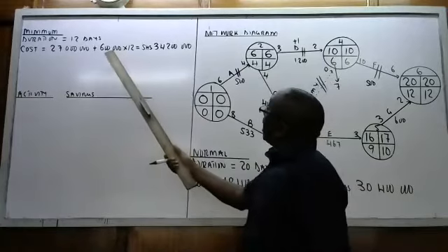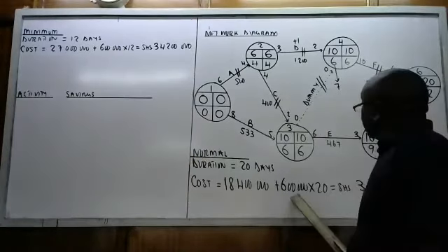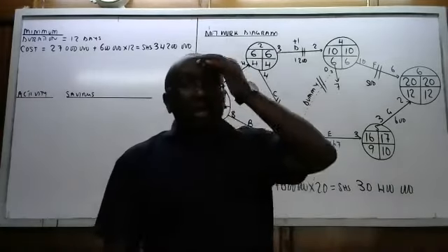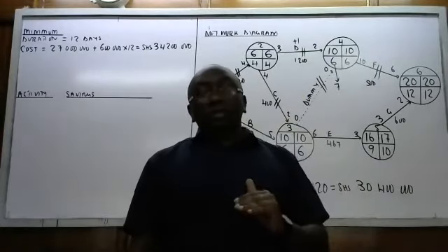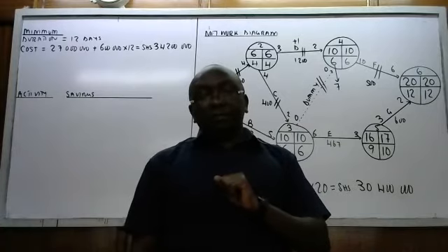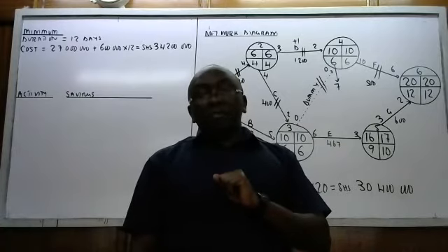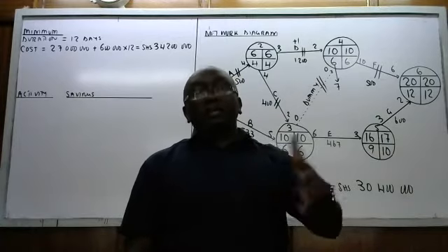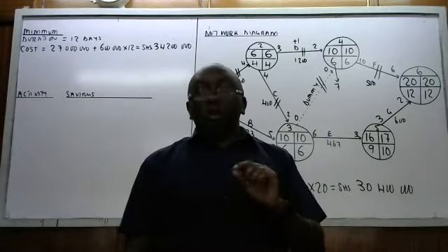The one that we are multiplying, this one. The meaning of that is, if you reduce the duration by 1 day, you save yourself 600. But if reducing that will make you incur more than 600, then it is not worth it.